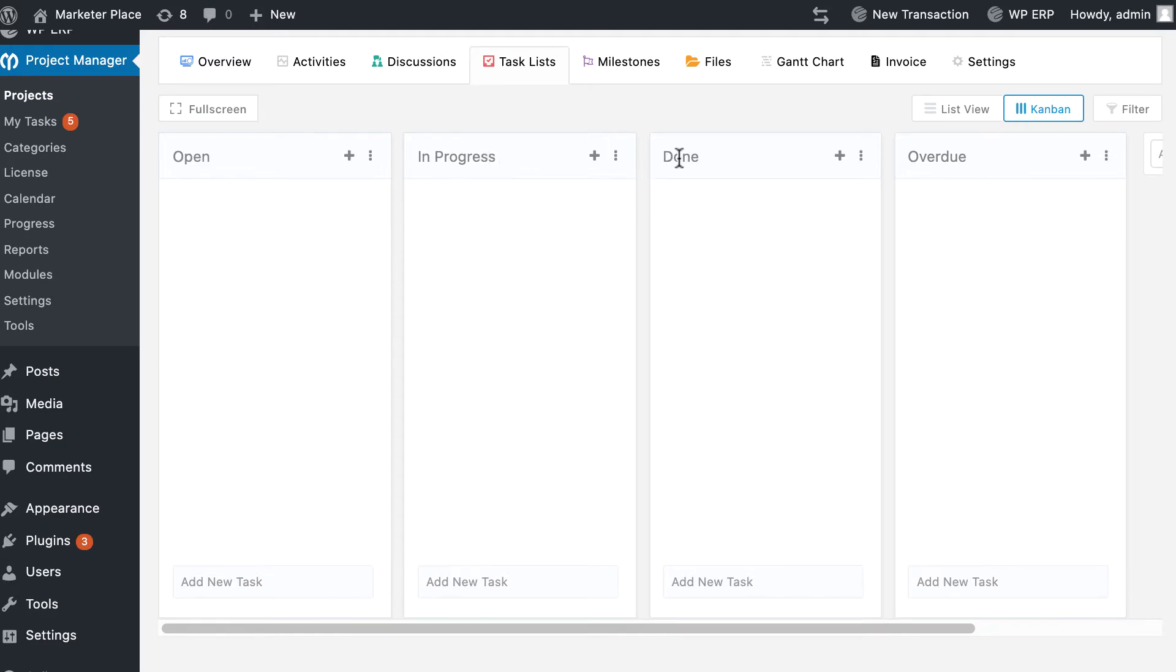Done: the tasks that you have already completed are on this board. When you move any in progress task to the done board, the status of that task will be shown as done in the task list.